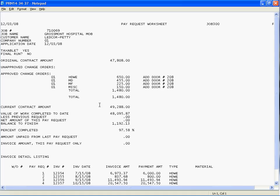Based on what you've invoiced, it will show you the total amount invoiced, what the balance to finish is, and the percent completion.